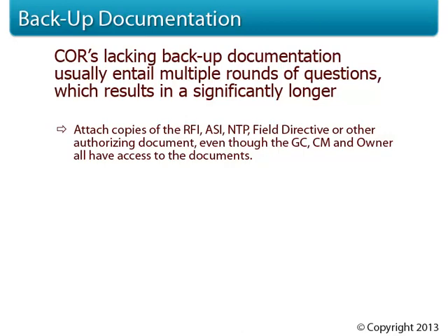Let's look at it statistically. It may only take 5 minutes for them to go check the RFI binder and drawings, but let's say they have 24 requests to review. 24 change order requests times 5 minutes each additional time for the reviewer equals 2 hours of extra time. When you add it up, that's a lot of time. This is why the clear and complete change order requests make it through the process so much faster. Remember, your request is just one of many in a big stack, and that stack is just one of many big stacks throughout the course of a project.